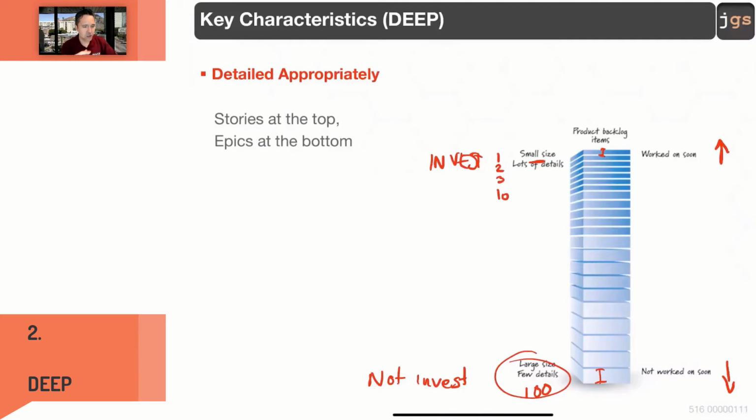Something short, something that one person can do in a sprint. This is the product backlog, but the goal is these things that are here at the top, the ones that are top priority in the product backlog, those are the first ones that are going to move to the sprint backlog. Those are the first ones that are going to be done. So they should be INVEST, but particularly small. And remember, small, basically one person can do it in 2 weeks. Small, not too small, they are not instructions.